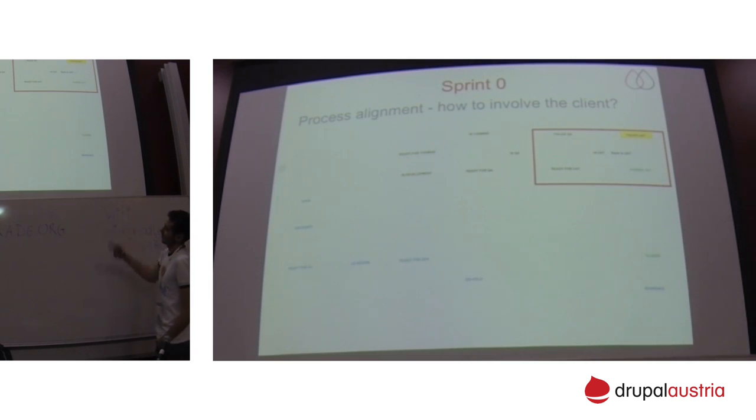So here is the second iteration with the client before the demo, because the client can go read the ticket, and we have different links to Zephyr test cases. It's actually the Zephyr test case, a written test case prepared by the QA that explains how the QA manually tested the specific user story. It is more or less like a guide. So following this structure, the client can definitely go and check if everything is good with the ticket.